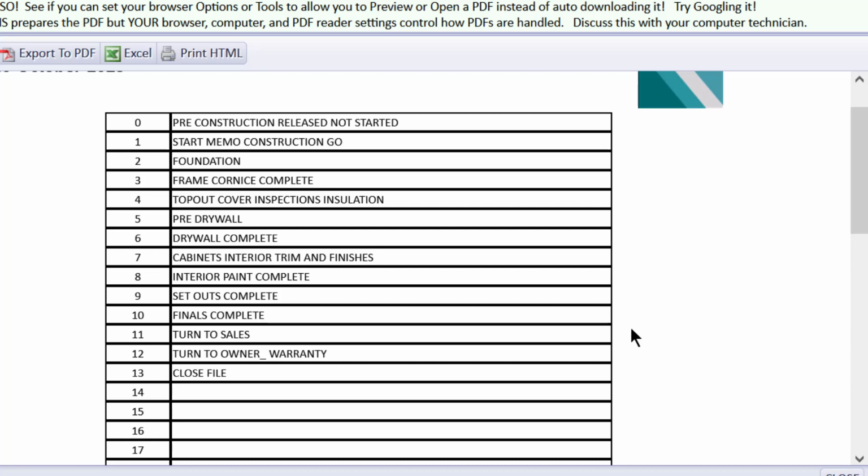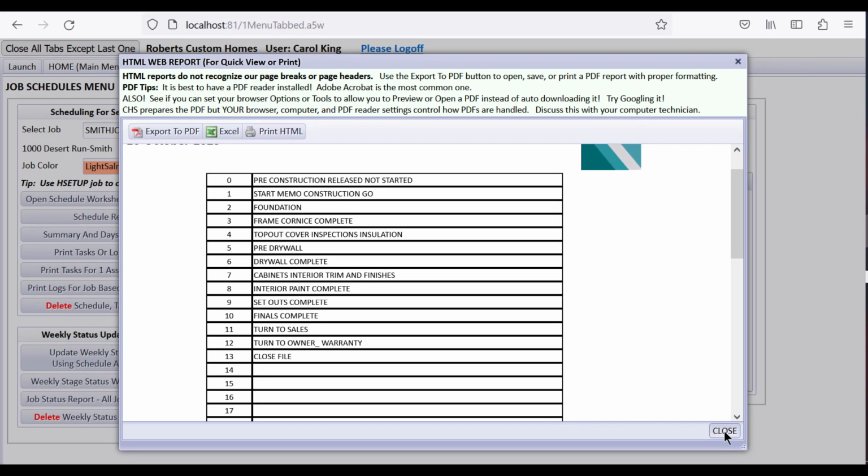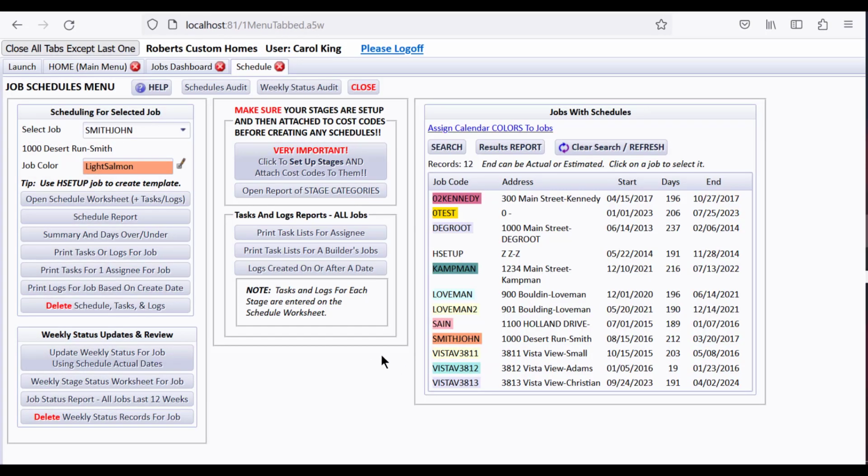a simple schedule list based on stages where you just say the number of days for each stage, but behind each stage you can make a list of tasks and assign them to certain assignees, various things, just as much as you want. But we made that a simple check mark, task is done thing, like a checklist, instead of having you attach dates and stuff to all of the various little tasks that you might want to have behind a certain stage. Also, you can do daily logs based on each stage, and you can do that here with the schedule.